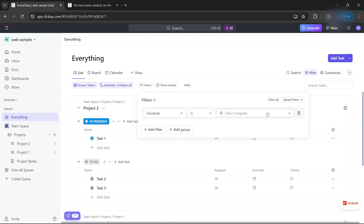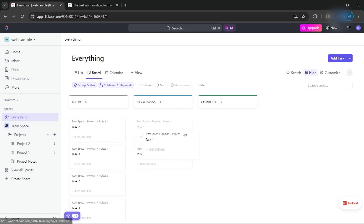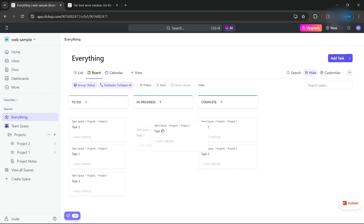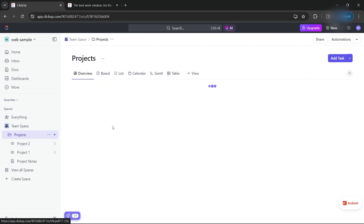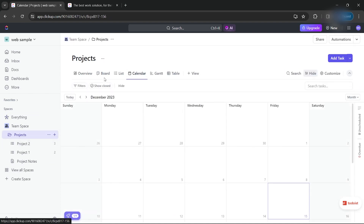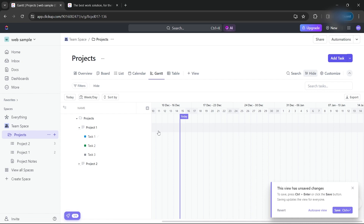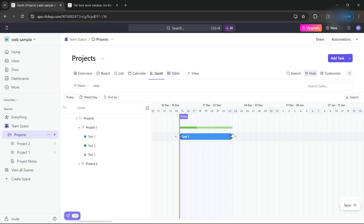In the Project tabs, you can see a more detailed version of your project. Click the plus button to add tasks. In the board view, you can move tasks based on status — simply drag a completed task to the completed column. You also have the list tab, great for tracking lots of tasks, and the calendar. The Gantt view is a visual representation of a project schedule that displays tasks over time — simply click on a date and stretch it to the end date.